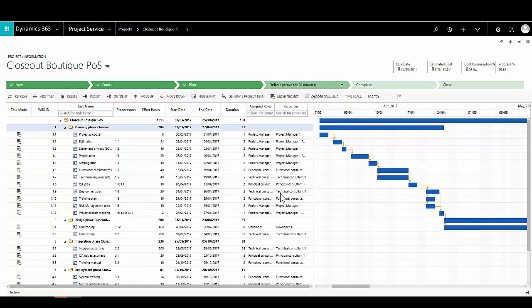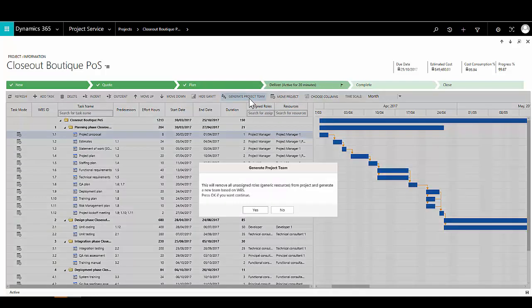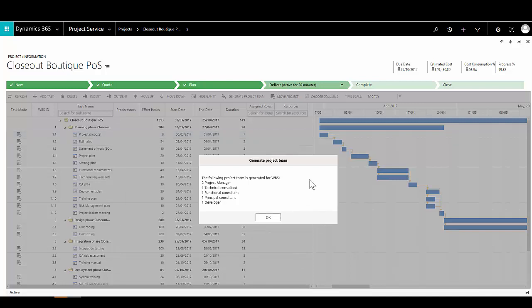Once we've created our work breakdown structure and assigned roles to each activity, we can get CRM to generate a project team for us using the Generate Project Team button. This reviews all activities in the work breakdown structure and determines the type and number of roles needed to fulfil those activities. CRM will then display the project team required to resource the project plan.